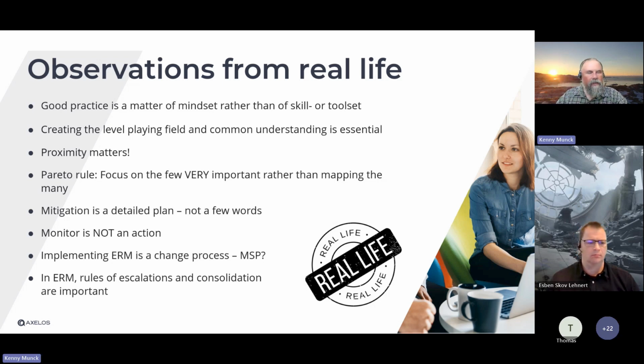If you use MSP, fine. You can also use different methodologies. And if monitoring is not a mitigation, it's only acceptance left. Yeah, it's actually true. So monitoring, yes, that's fine. Of course, we can keep monitoring, but let's be clear that monitoring is not removing the risk, it's not doing anything to the risk. The risk remains. What we can monitor is how the risk develops, and that's fine. But we're not doing anything.